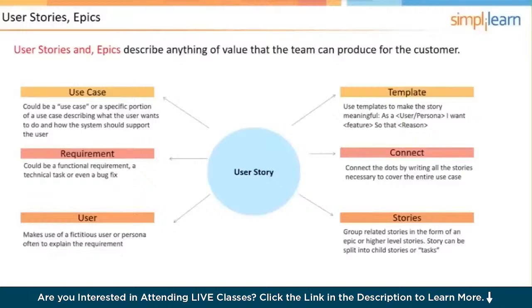The reason it would be low priority is that if an epic was higher up on the product backlog, it would have to be more detailed. That's when you would break it down. Epics usually live at the lower priority levels of a product backlog, and as user stories are completed and the epic rises in priority, it will eventually be broken down into more manageable user stories. So, great big low priority user stories.